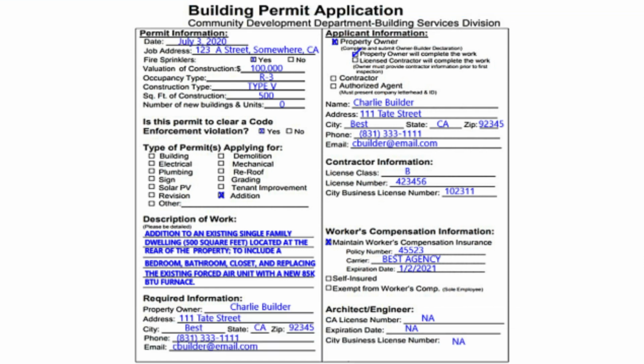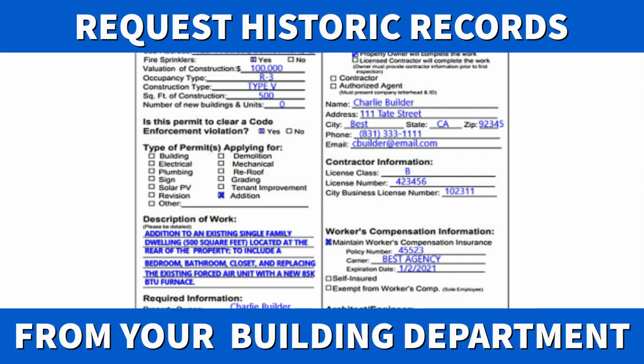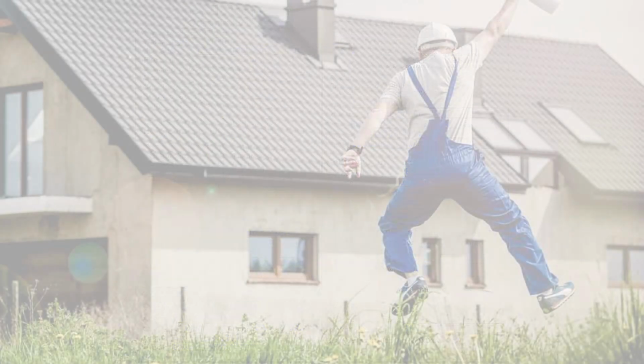Lastly, and perhaps not related to the building permit application, before an agency processes your permit application, a search of your property's permit and code violation history is made. If there are any expired permits and/or open code cases against your property, it can hinder your ability to obtain a building permit. So get ahead of this by conducting your own research prior to purchasing a property through public records information.